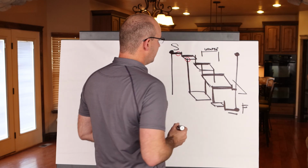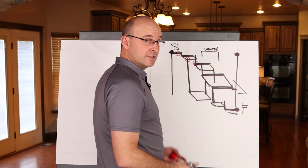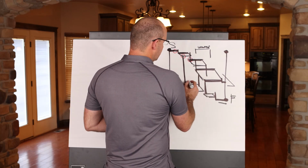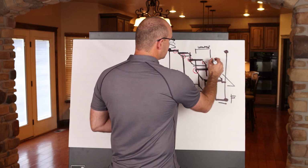Is this the correct tie from structure to the other phase? Can we get foundations to release the superstructure on time? Is there any way to optimize that? When can we start the exterior and the interior based on how the building is going up? So you should see marks all over this thing, right?